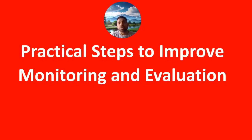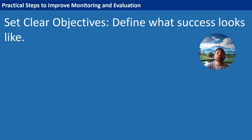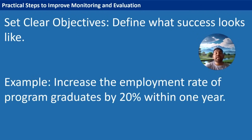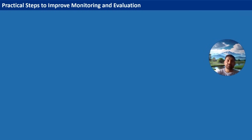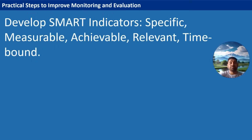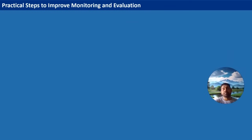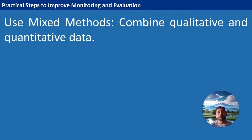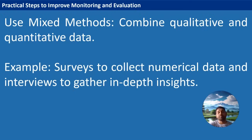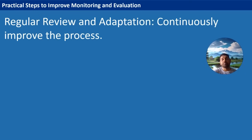Now let's discuss practical steps to improve monitoring and evaluation. First, set clear objectives — for example, aim to increase the employment rate of program graduates by 20% within one year. Second, develop SMART indicators that are specific, measurable, achievable, relevant, and time-bound — for example, the percentage of graduates employed within six months. Third, use mixed methods to gather both qualitative and quantitative data, such as surveys for numerical data and interviews for in-depth insights.